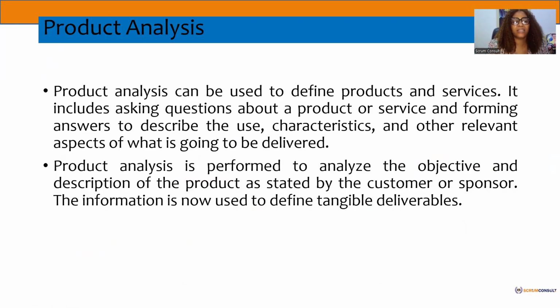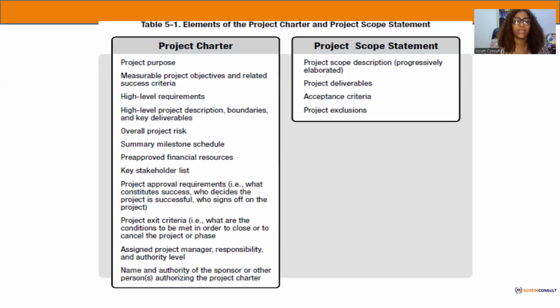So this is product analysis. It can be used to define the product or services. It includes asking questions about the product or the service and forming answers to describe the use, the characteristics, and other relevant aspects of what is going to be delivered. Product analysis is performed to analyze the objective and description of a product as stated by the customer or sponsor. The information is used to define tangible deliverables, products.